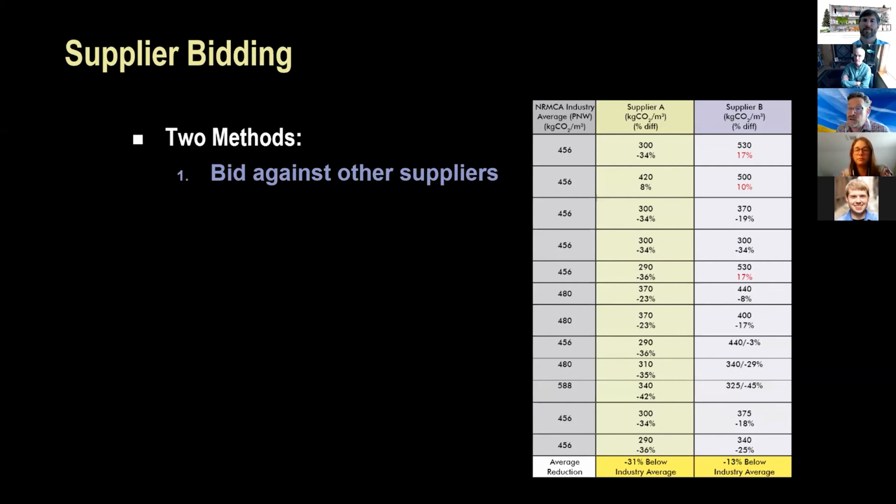One way to do that is to say, provide us your conventional solution, which in many ways is what's tried and true and familiar, but be silent on GWP. And then the other way is to say, in addition to that, provide your solution for each of these applications that is the carbon optimized one. And there you get 2 price points, you get 2 solutions, you give the owner some choice there, you give contractors the choice, if it works. So that's one way to address this method.